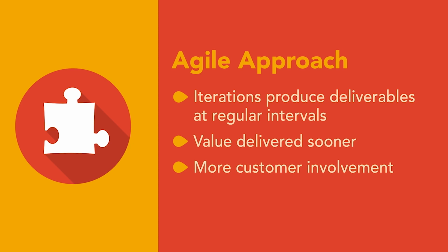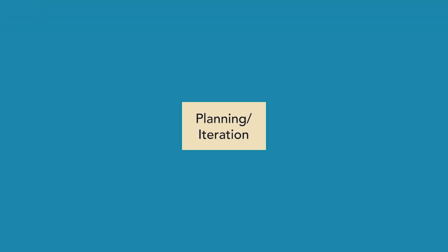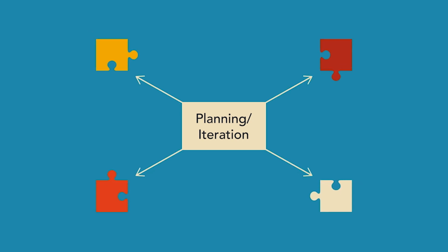The customer has to be more involved than in traditional projects. Project teams tend to be smaller, more experienced, and able to work without much supervision. During initiating and planning, you define the overall goal for the project and build a plan to achieve that goal. With Agile project management, you then develop detailed plans for each iteration.